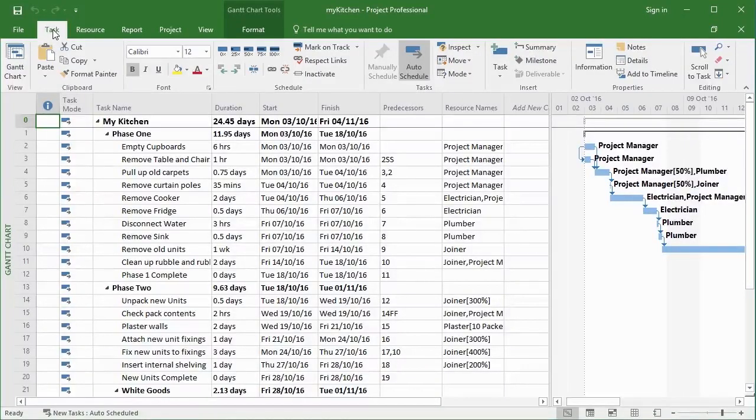So we've seen the basics of the WBS, work breakdown structure, a system that allows you to number your project tasks in a hierarchical way. We also saw the drawback to using the default numbering: adding new tasks, deleting tasks, and moving tasks caused that numbering to be automatically updated. So what we now need is a similar system, but one that does not automatically update itself when you amend your tasks, and one that we can control the design of. So we need a custom WBS.